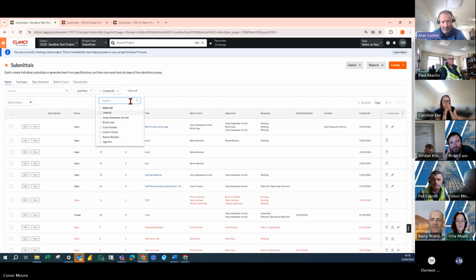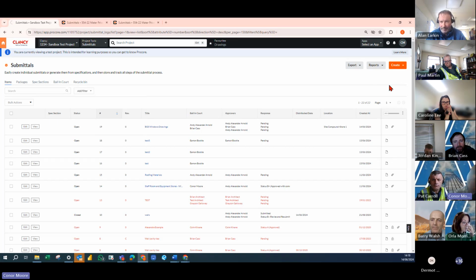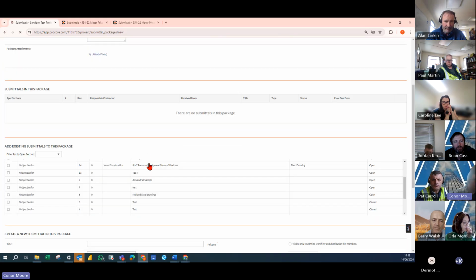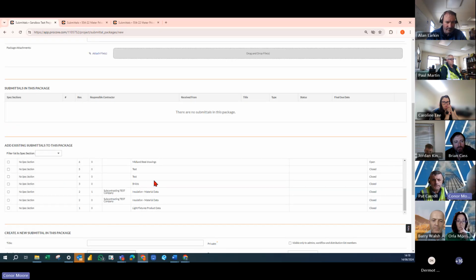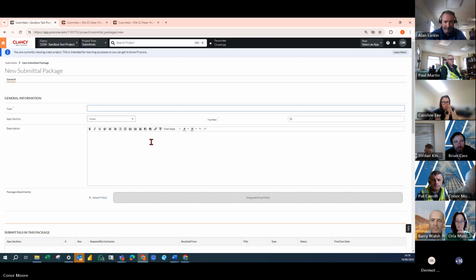Connor, just a quick one there. So say, for instance, the project's been going and a lot of submittals are unpackaged, can you change them into a package, or do they stay unpackaged? You can change them into packages as well. When you're creating a submittal package, at the bottom it will ask you if there are any of the previous submittals you want to add to a package. So you can do that down here. Yeah, that can be done.